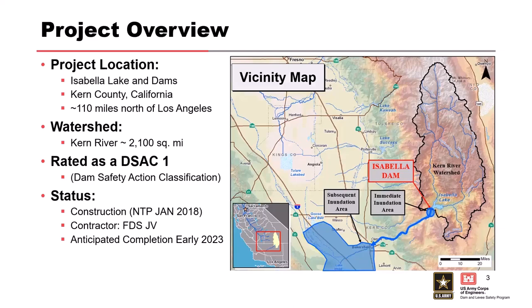We're in construction and wrapping up. We had a notice to proceed in January 2018. The contractor is a joint venture between Flatiron, Dragados, and Sukut. We're anticipating completion of this project in early 2023.